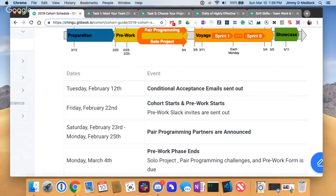So basically, Sprint Zero is developing the main sagas in Scrum terms. That's absolutely spot on. In Scrum terminology, there are really 3 divisions of items in your backlog. You have sagas, which are extremely high-level things. They span almost the whole voyage, in many cases. Then you have epics, which are typically larger items. They cannot be completed in a single sprint, so they may span 2 to 3 sprints. And then finally, you have just a task, a user story, and the life of the user story is a single sprint. So it's very granular.